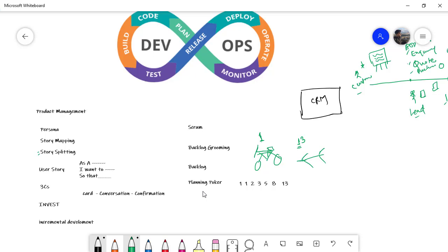And this is where this little phase is going to enter again, which is story splitting. When you see a story with 13 points, you are not going to work on that story. You're going to split that story into smaller consumable chunks. For building a plane, probably I'll have to build a mechanism for landing, for takeoffs, right? And they are going to be massive stories in themselves. So suppose you build a story for takeoff, that is going to be another 13. Landing is going to be another 13 because you don't know all the activities, all the tasks that are going to go in for the takeoff to work the right way. All right, so 13 does not mean 13 times more difficult. 13 means that it is something that your mind cannot pursue.